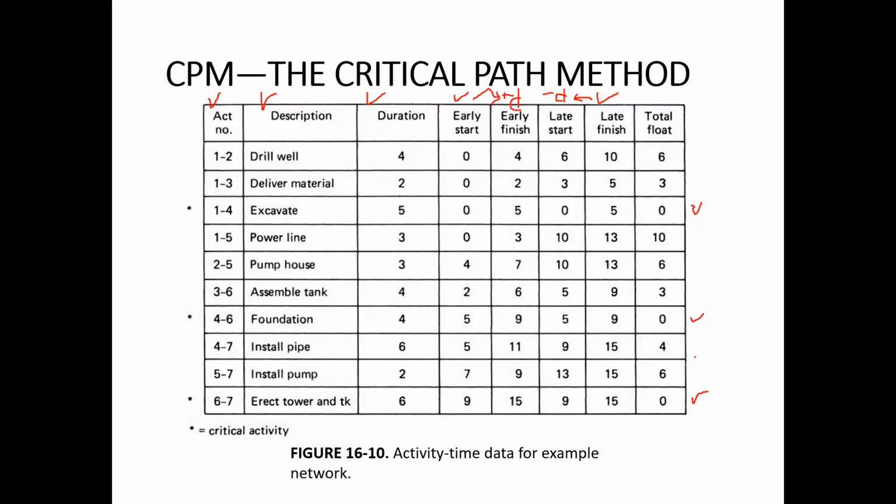Yes. Design is another part. Not design, it's just preliminary management, let's say, preliminary planning. Okay, now I can answer it. For preliminary planning, normally the planners use the bar chart method. For detailed planning and more accurate planning, the planners use the network method. So for more accurate and detailed planning, the network method is used.